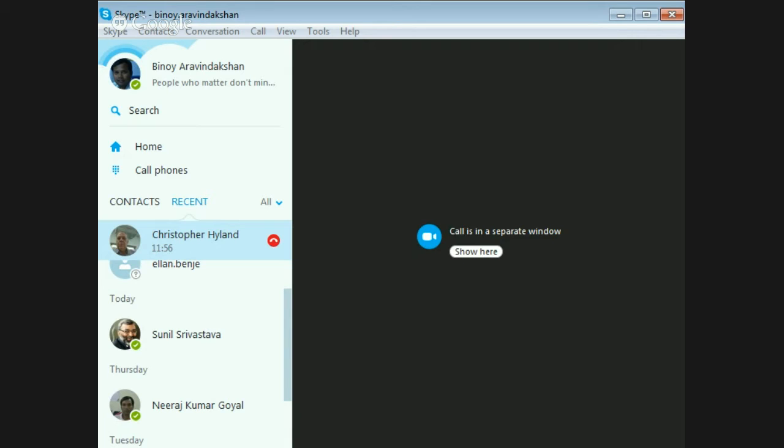We've done 3 apples out of 10 apples, but for putting it all together in what we call an S-curve, where we can take all the items of work. You can't see these very clearly at the moment, but the next slide will show those. They include things such as general requirements, mainline stations, and all the cost of those elements. So against their programs, which are going through here, we add costs and completion, and can actually generate a plan curve for what's essentially the value of the work at that specific time.